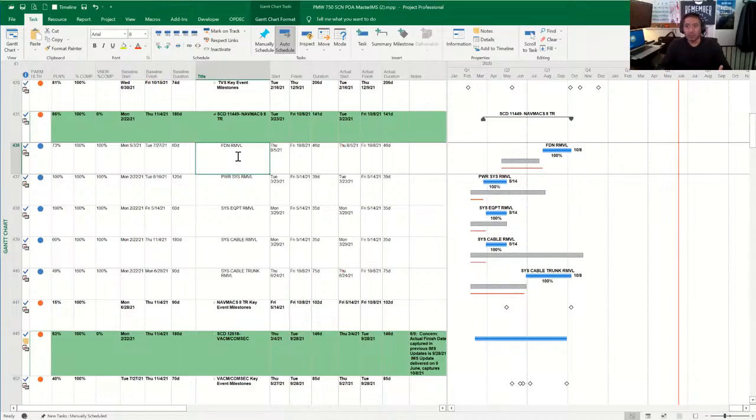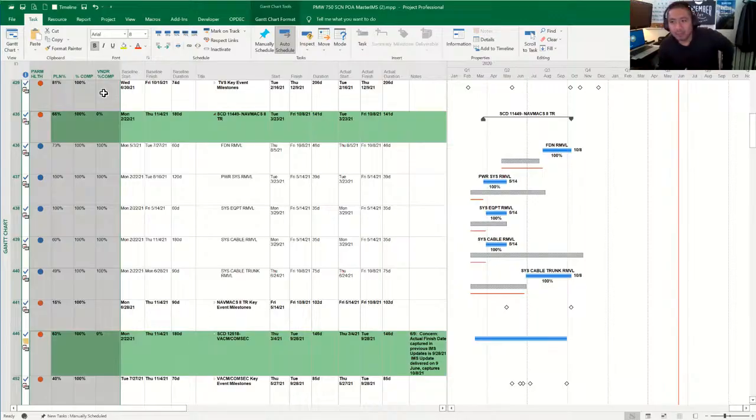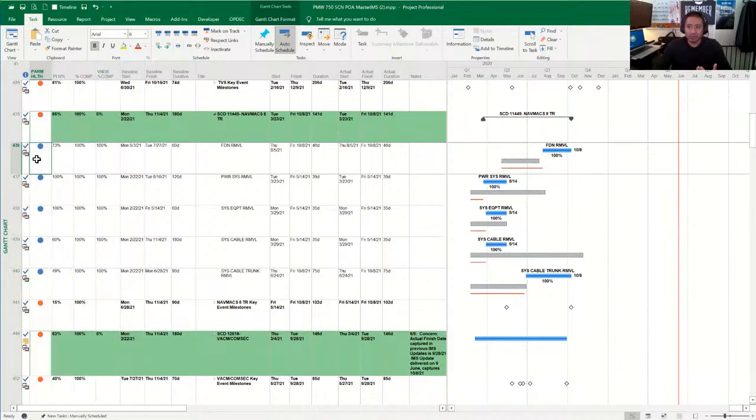In order for me to tell the story, I focus on 4 columns, mainly because I'll be able to tell each stakeholder if and when we were off our budget and behind our schedule. Meaning, you don't see the legend here, but with the traffic lights, the blue stands for completed, the red stands for delayed. Other colors in here, as far as the traffic lights, are yellow and green.